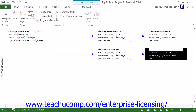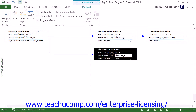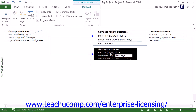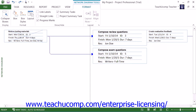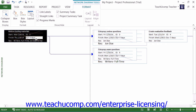As you complete the tasks within your project file, you will see a single strike line appear on tasks when work has commenced. You will see a double strike-through line appear over task shapes when work has been completed.